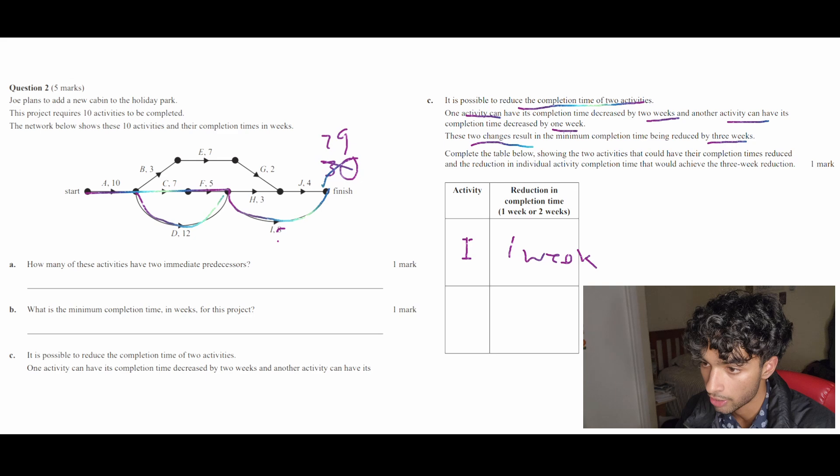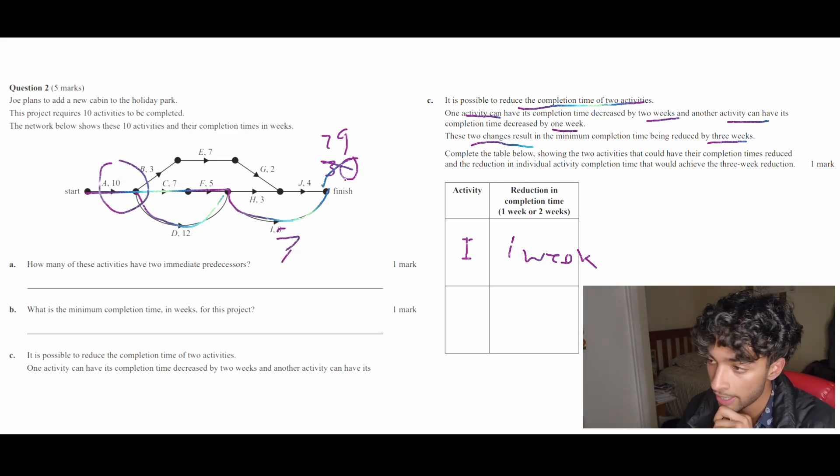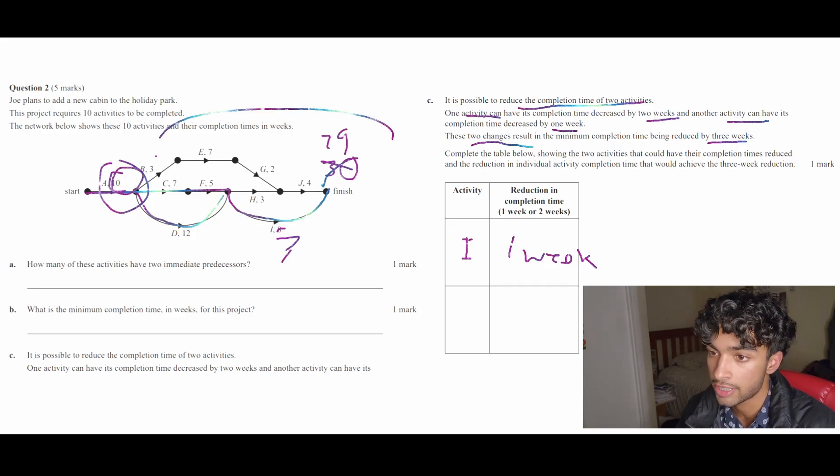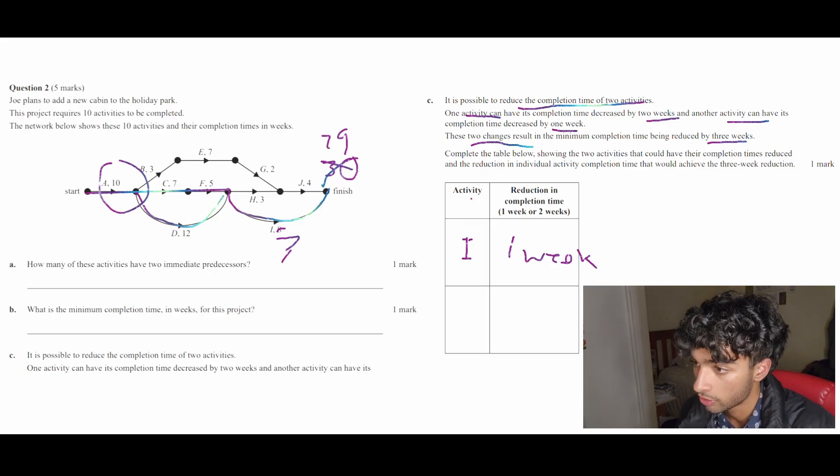So right now it's 29 and I at 7. Well, obviously this start right here at activity A, we can reduce this however much we want and it'll reduce the entire thing because it's the start and everything is connected starting from A. So we can put in A, activity A, and reduce it by two weeks.